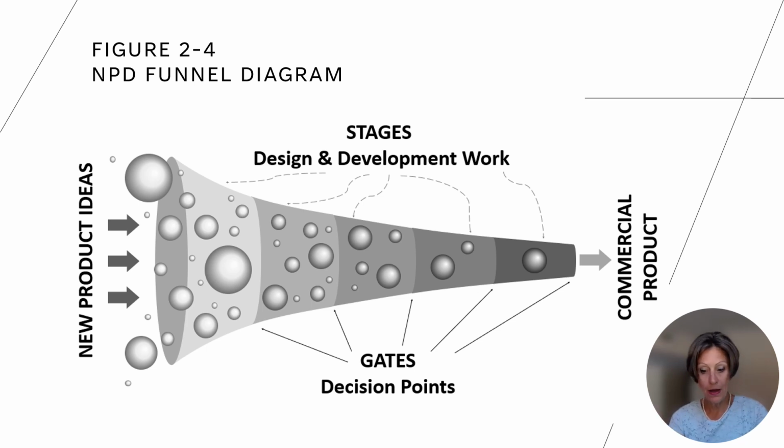to a 1-gallon batch pilot test. If test results are as expected, the next stage would increase investment to a 100-gallon continuous operation pilot plant before being approved for normal day-to-day production. Knowledge and experience gained from lab experiments at a test tube scale provide guidance for the batch pilot test. Likewise, batch testing provides further know-how to operate the small-scale continuous reactor, and so on.